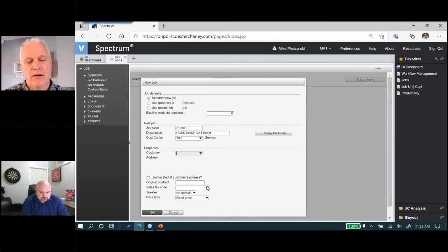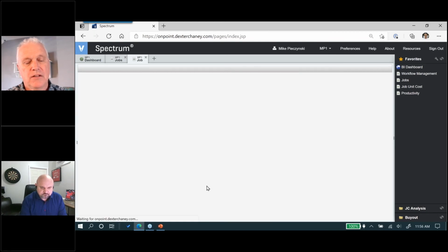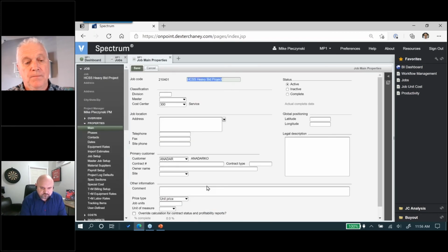I'll hit enter and go to the customer. If I remember right, A-N-A-D-A-R, do I have that right? Yeah, otherwise I could have hit list. You can, but you don't have to put in the original contract. We're going to bring this file in so quickly, I'm not worried about that. And I will make it a unit-based contract. All right, this is a unit-priced contract. So we've set up our job. I'll hit F3 to save and close.